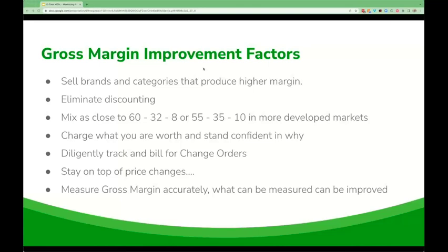Also, today, you guys have all experienced frequent price changes. We're going to be dealing with that as an industry for quite a while because of just the labor shortage and then also inflation that we'll be stuck with. So put an expiration date on your proposals. Stay on top of those price changes. Again, D-Tools Cloud does an amazing job of connecting with your vendors and your brand.